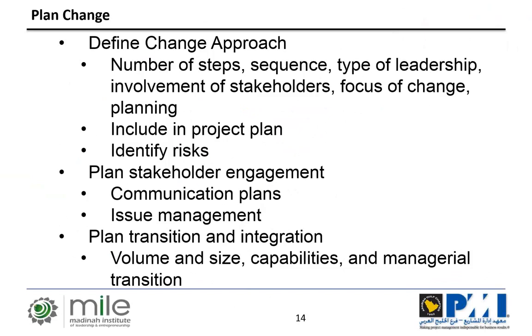Here comes a very interesting topic. Include in your project plan. So this is probably the first time that these two things, change management and project management, come together. This is something I have learned through my practice, and I have seen many projects succeed and fail because they do or don't do this: you have to include your change management activities within your project plan. This is part of your project. You have to include those activities so that they are properly accounted for as part of the work that you're going to perform within the project.